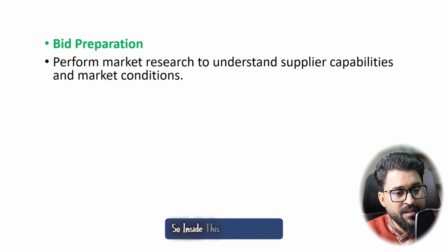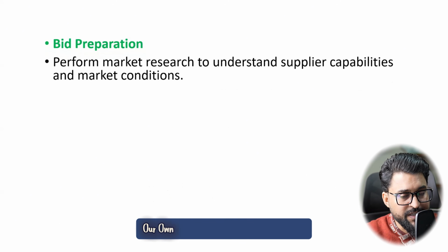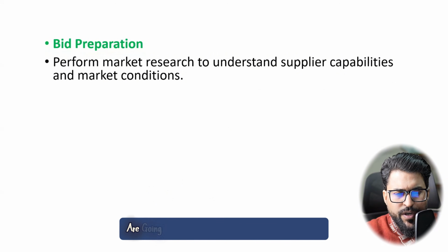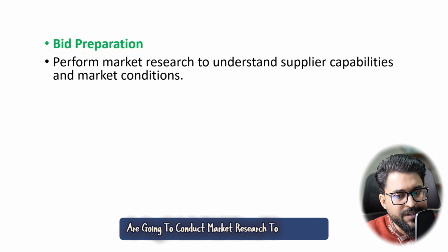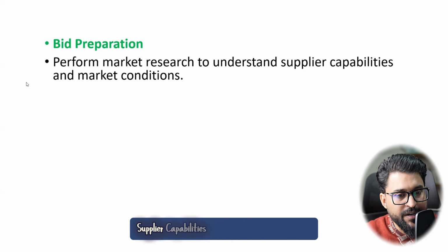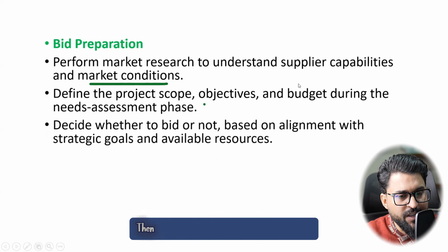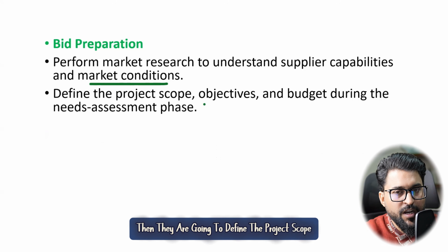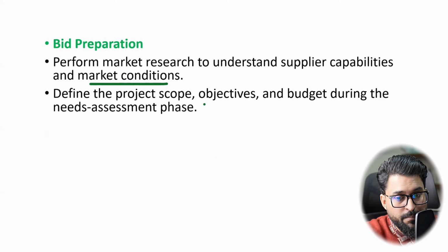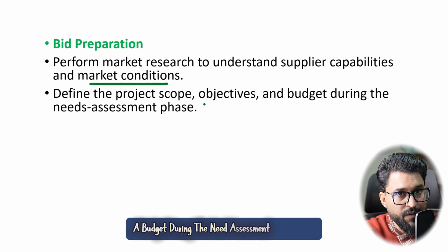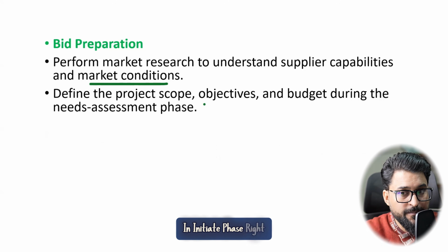Inside this bid preparation, our own consultants and quantity surveyors are going to conduct market research to understand supplier capabilities and market conditions, right? They are going to talk about this before preparation of all these things. Then they are going to define the project scope, objectives, targets, and budget during the need assessment phase, in the initiate phase, right?